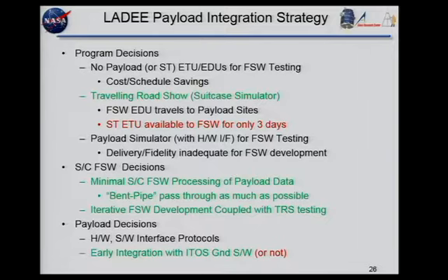So along with the traveling roadshow, I'll save that for the traveling roadshow, we iterated through the development and the requirements development. The payloads themselves, as much as possible, we tried to get the new developments to conform to what we wanted for the interface to look like. Like, here's your set of app IDs and use CCSDS. But the ones that were COTS, we couldn't really dictate to them because they were supposed to be COTS.